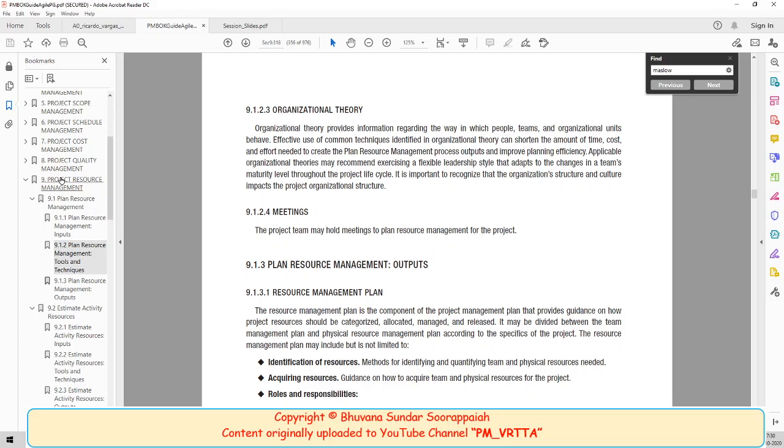But then you're also saying that sometimes in the rainy season, or in monsoon rain, you may need 10 days because the sun is shining only in bits and pieces. But you know that in your part of the world, even in the worst of seasons, rain will not be so heavy that it will stretch the baking part by more than 10 days. So that's your pessimistic estimate.